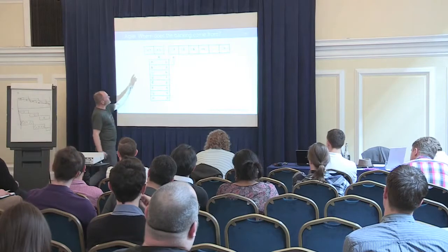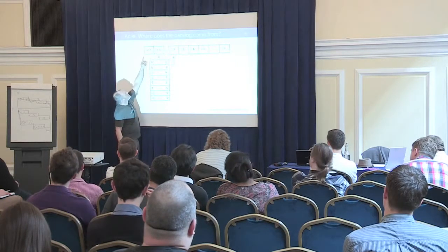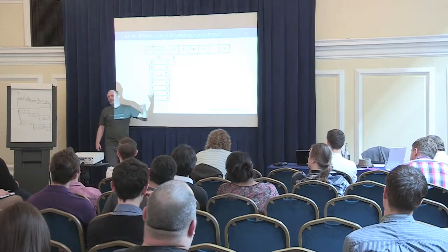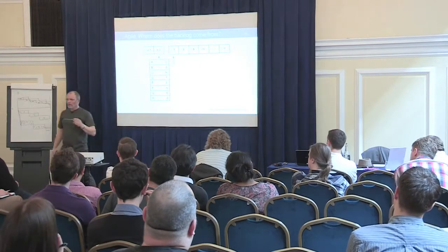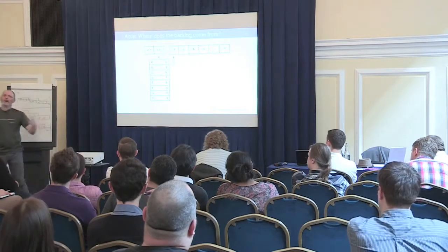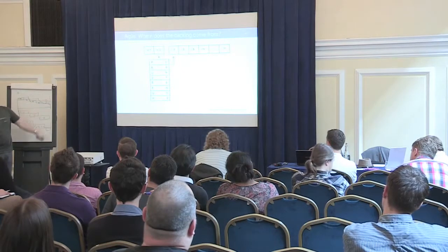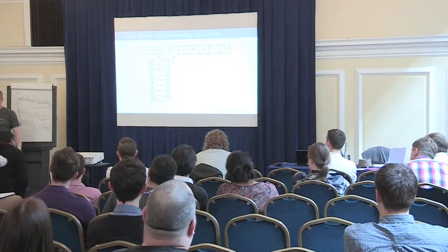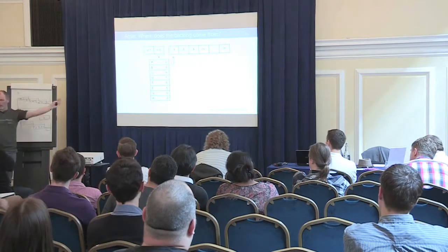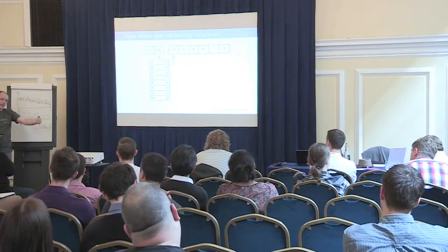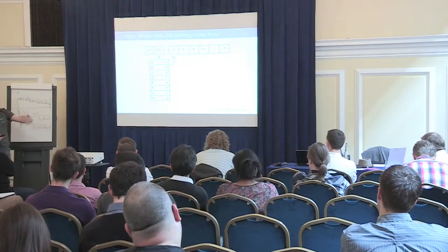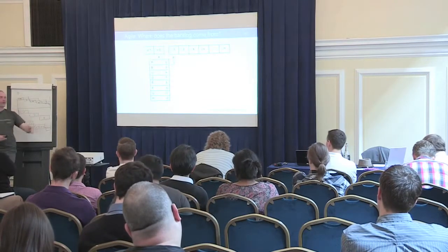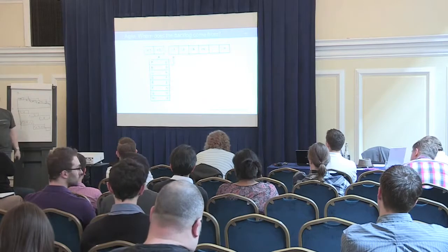So basically what we usually do in projects is we start with one or two preliminary iterations where we investigate stuff like that. So on the backlog here will be stuff like, oh, create a project plan. Oh, do an estimate. Oh, get the requirements in order. Oh, do a baseline architecture. Stuff like that. And you can also move them from left to right on your board, right? It's the same idea. It's basically also work items. You can estimate how much work they are, and you can try to get them finished and get to the point that you can actually implement stuff.